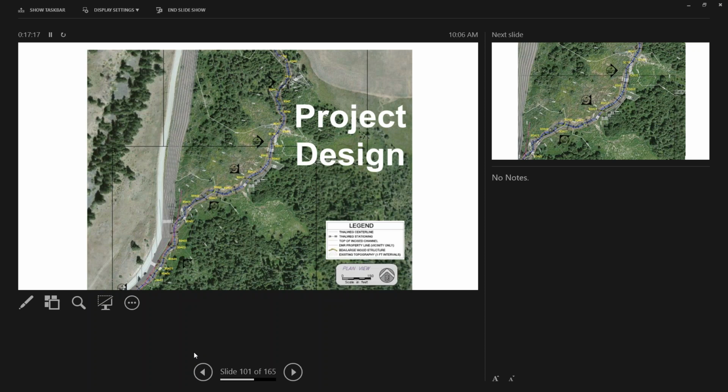I think overall my biggest lesson learned with regard to project design is that I would rather have more of my budget available for adaptive management than to spend most of it on project design, because it's really tempting. We all want to see success, and we get really concerned about details, and details matter. On a certain level, yes, we have to have a solid project design.